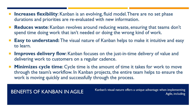Kanban's visual nature offers a unique advantage when implementing Agile, including: the Kanban board is easy to learn and understand; it improves flow of work and minimizes cycle time; it also increases flexibility — Kanban is an evolving, fluid model with no set phase durations, and priorities are re-evaluated with new information. It also reduces waste, ensuring that teams don't spend time doing work that isn't needed or doing the wrong kind of work. It also improves delivery flow — Kanban focuses on the just-in-time delivery of value and delivering work to customers on a regular cadence. Cycle time is the amount of time it takes for work to move through the team's workflow, and in Kanban projects, the entire team helps ensure the work is moving quickly and successfully through the process.